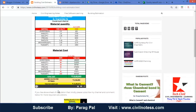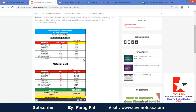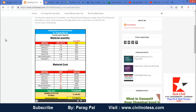Like this, you need to put all the rates for the required materials. At the end, I am adding 22% for fittings and contingencies, which is a contractor profit value. After that, the overall cost comes to approximately 1,598,874 rupees. Note that here I am only providing quantity and material cost — contractor profit for overall building construction is not added yet. I am preparing a new sheet where you can get a full estimation of the building.